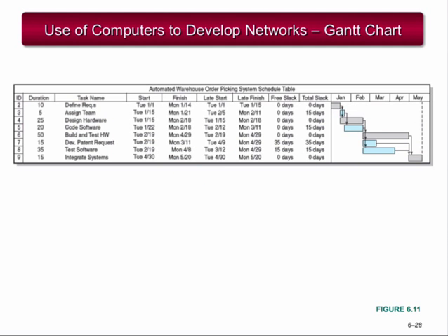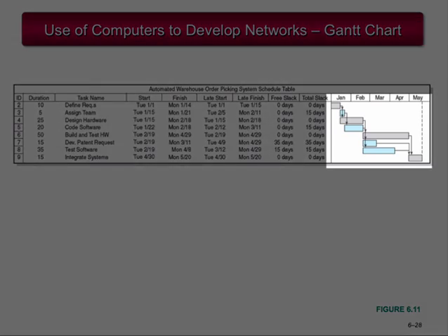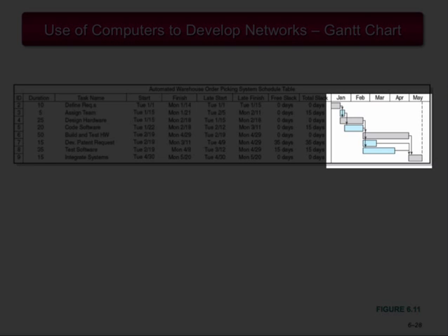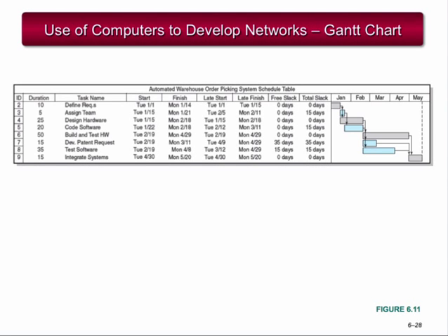This example from the book presents an early start Gantt chart. This provides an easy-to-understand, clear picture in a time-scaled horizon. This format is a two-dimensional representation of the project schedule, with activities down the rows and time across the horizontal axis. In this example, the shaded bars represent the activity durations. The extended lines from the bars represent slack. Unfortunately, when projects have many dependency relationships, the dependency lines can become overwhelming, defeating the simplicity of the Gantt chart.